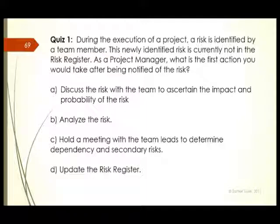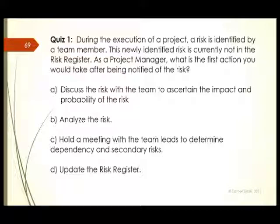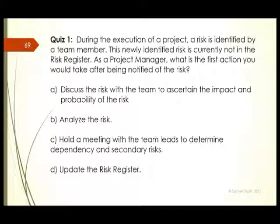You need to assess whether it's actually going to happen or whether it's not that important. When someone identifies a risk, before adding it to the risk register you need to analyze it first — figure out which risk we're actually talking about. If you analyze it and find it's a real risk, then yes, you add it and determine the probability and impact as well.